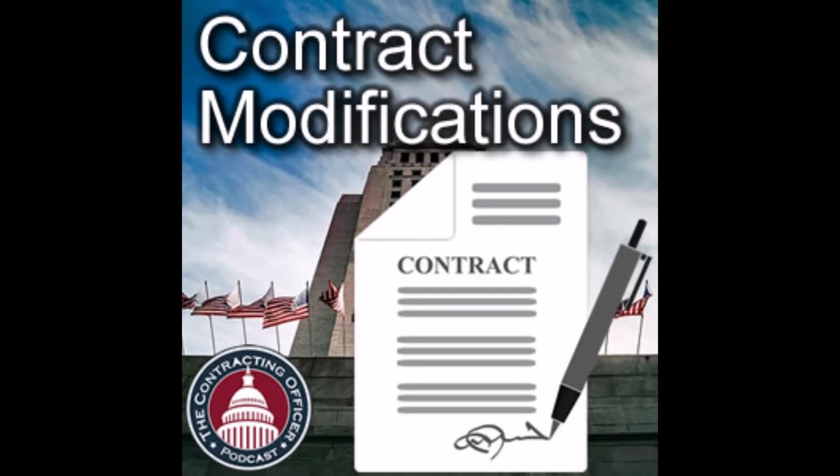So pretty much assume that if the change or modification is just doing more of the same that you were doing before, you don't even have to negotiate fee. Just stick with what's already been negotiated. And if somebody asks you why you did that, you use 15.404(b)(6). But don't automatically do that. If it's something different, you can negotiate fee on either side. But this is one of those small adjustments that can make things a whole lot easier. They can move contracts faster.